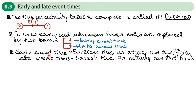The early event time is the earliest time an activity can start or finish — start if the boxes are at the beginning of the activity, finish if the boxes are at the end. This includes the fact that previous activities must be completed. The late event time is the latest time an activity can start or finish, so the latest start time is in the bottom box on the left side of an activity, and the latest finish time is the bottom box on the right side.